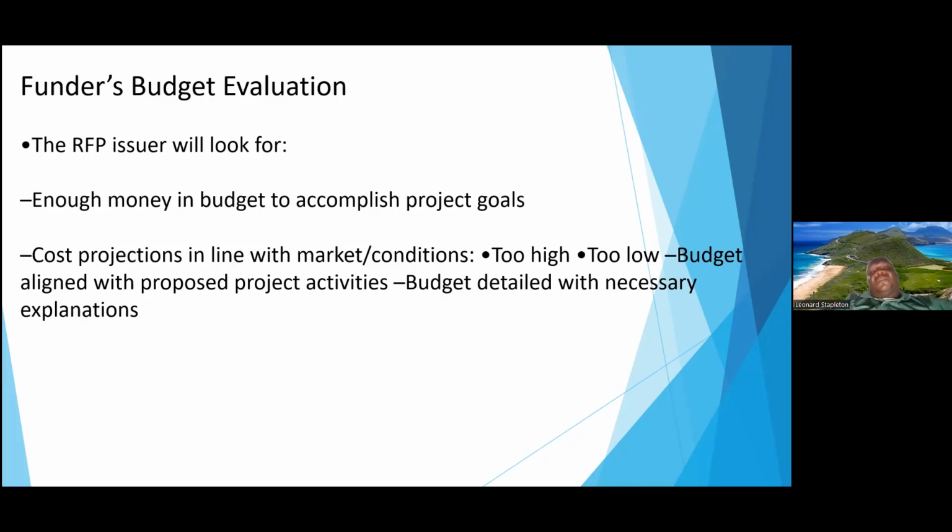these people who are charged with evaluating the proposal will notice. You might just say out of your head, okay, I need a solar panel. The last time I heard, solar panels were selling for 10,000 US, so let me put down 10,000 US. So things could happen if you don't verify and get estimates and quotations. One thing that could happen is that the price of the solar panel may have gone down to 5,000 US as they make improvements in these things, but you put down 10,000.